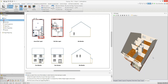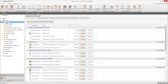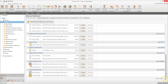Now let's move to the estimate module and take a look at the estimate in more detail. As you drafted your plans, BuildingWorks used the specifications you selected, combined with the dimensions of the design, to estimate each element of the job. Click estimate on the project explorer. You'll find yourself looking at the estimate dashboard. Here you can see the cost of each component, and if you scroll down to the bottom you'll see the total cost of the job.